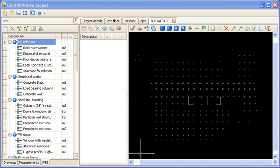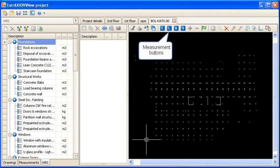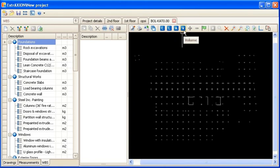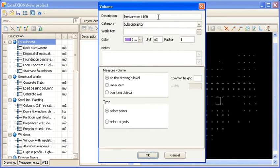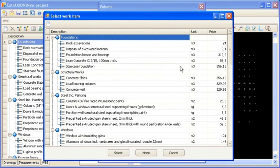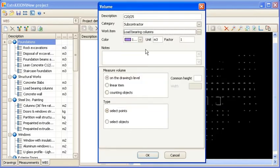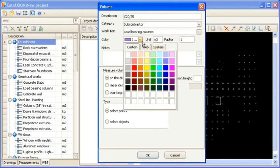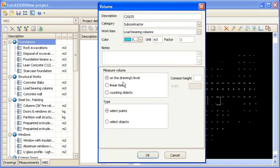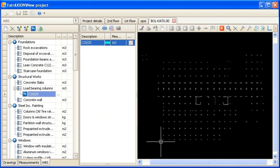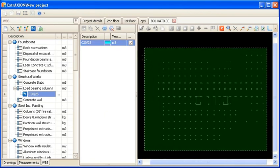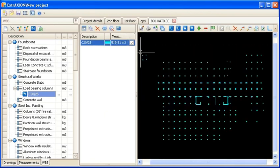By selecting all closed polylines in the concrete hatch layer, you can calculate the corresponding total concrete volume. You can start by pressing the V measurement button used for measuring volume. In the volume window, you can set the description and specify the WBS work item with which this measurement is affiliated using the pop-up window, in this case, load bearing columns. You can then set the remaining details and the floor height. In the type box, click the select objects option. Now, you can select all the hatched objects. By terminating the measurement procedure, the total volume is automatically calculated and shown.